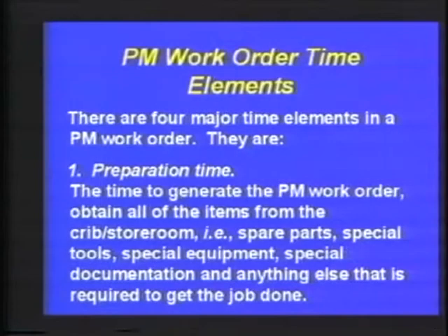The first one is preparation time. Preparation time is a function of the storeroom. That is the development of obtaining all of the equipment and identifying equipment by part number, description, unit of measure, and tying that equipment in with the PM work order number. If there are special tools, equipment, and documentation required, it's up to the storeroom to apply those three requirements to the work order.